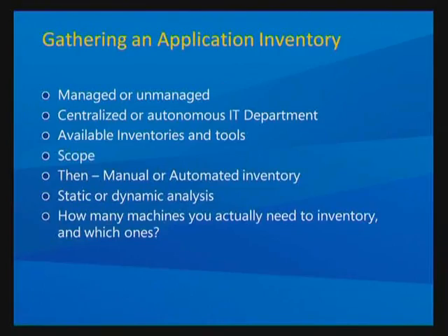Availability of the inventories and tools. When you think about what applications are in your system, there are different places you can look. I remember I had a technical writer who said, well, they can just go to Add Remove Programs and write it down, versus an automated tool that we have like ACT, versus some of the newer static tools that are out there like Camwood or ChangeBase that are looking at your MSIs. And when you decide, first you need to know what your environment is. If you're in a really well-managed environment, then those static tools that are just looking at your MSIs are great.